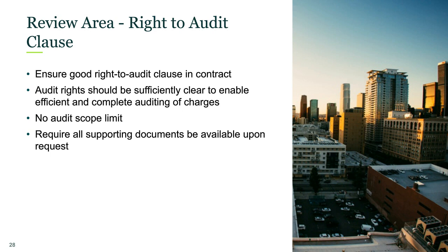So what I find, and we'll go through timing of audits, is that when you review the cost early on and you identify things that may not be compliant, having good discussions with your contractor is good for clarifications. It's easier to negotiate $50 for something that's not fully supported by the contract. It's a lot easier to negotiate $50 versus $50,000. So getting the right to audit clause, getting the cost, and validating contract compliance is critical.